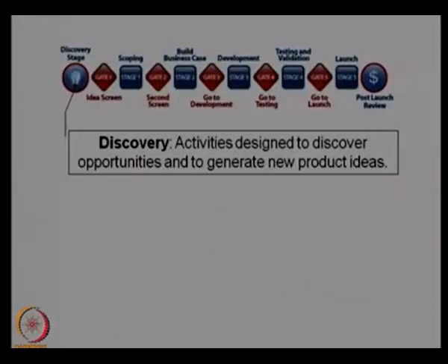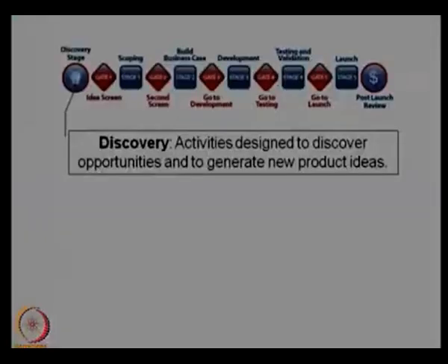So if there is an opportunity to develop the product, identified by the discovery of the opportunity of that particular product or a process, and if it is worth proceeding, then go ahead with that. In the first gate it will be passed and it will go to the next level of product scoping, do a market survey and try to understand what the customer requirements are, whether there is a real need for that particular product.